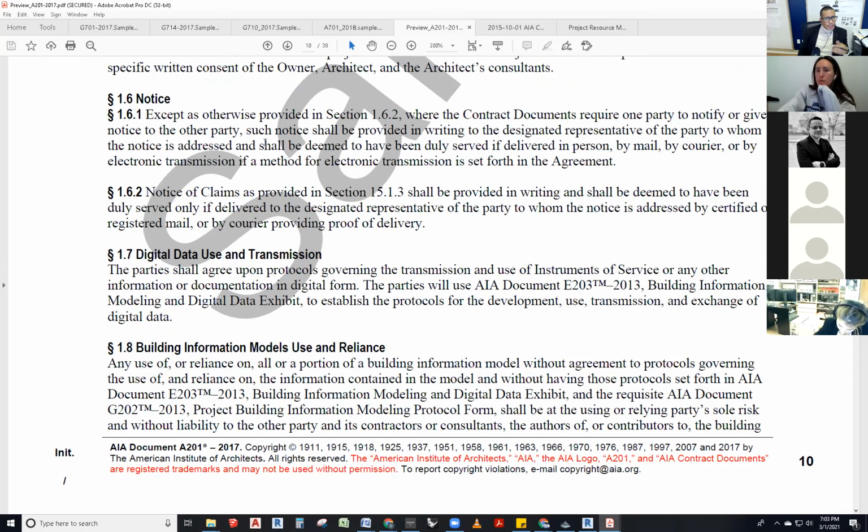Notices are very important, as you will see and have heard on B101. There's this 7 days notice, 10 days notice, 14 days notice, and so forth. And they're very important because the clock starts ticking when the person got the notice, not necessarily when you sent the notice, when they got the notice. So that's why it's certified mail, and being delivered by carrier. That stuff is very important, right? Because time is of the essence.